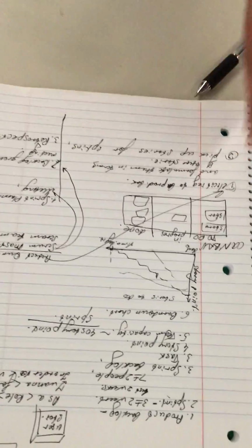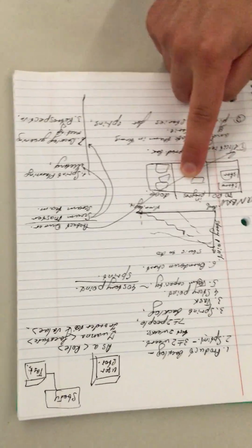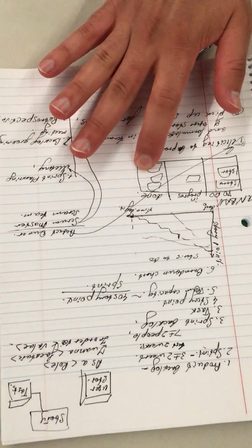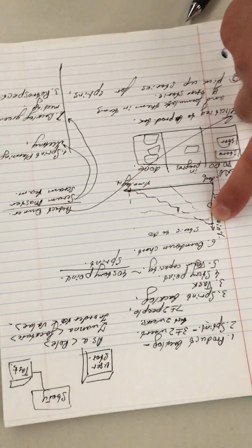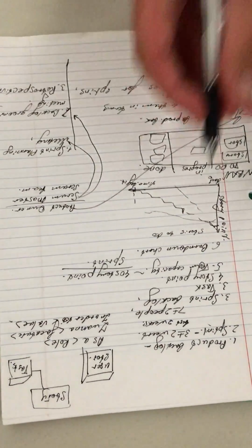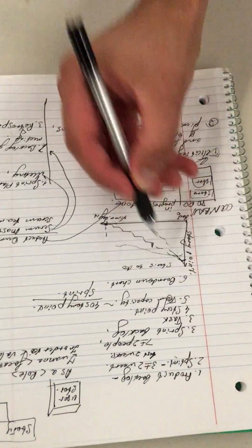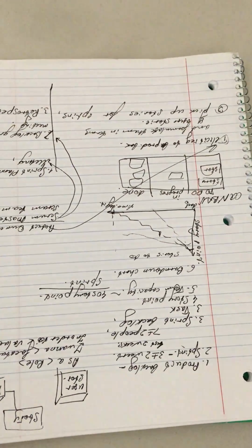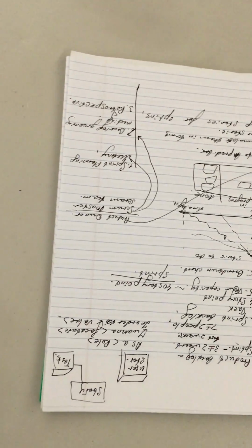Let's say in the beginning of the sprint you have everything here. Next you drag one story over there. Next you drag it to done. When it comes to done, it's subtracted from to do here. And there's gonna be some small step down. Someone else drags a story to done, and yet another step down. You see? But throughout the progress, we can actually have some more stories added.